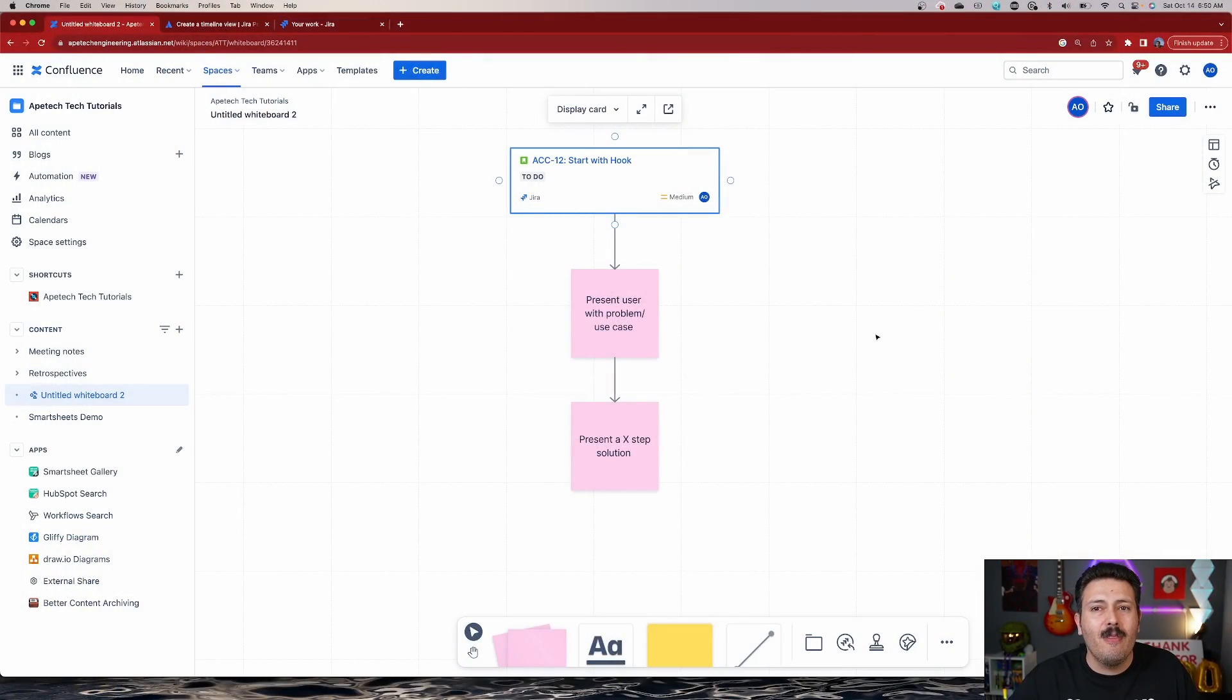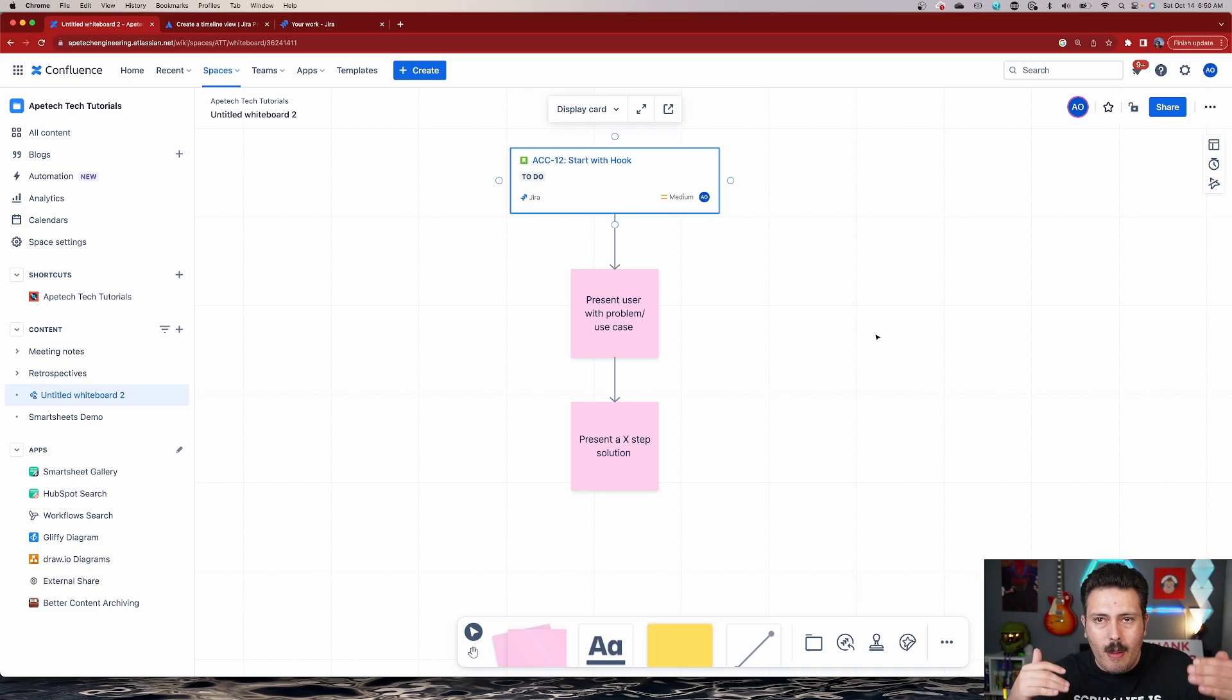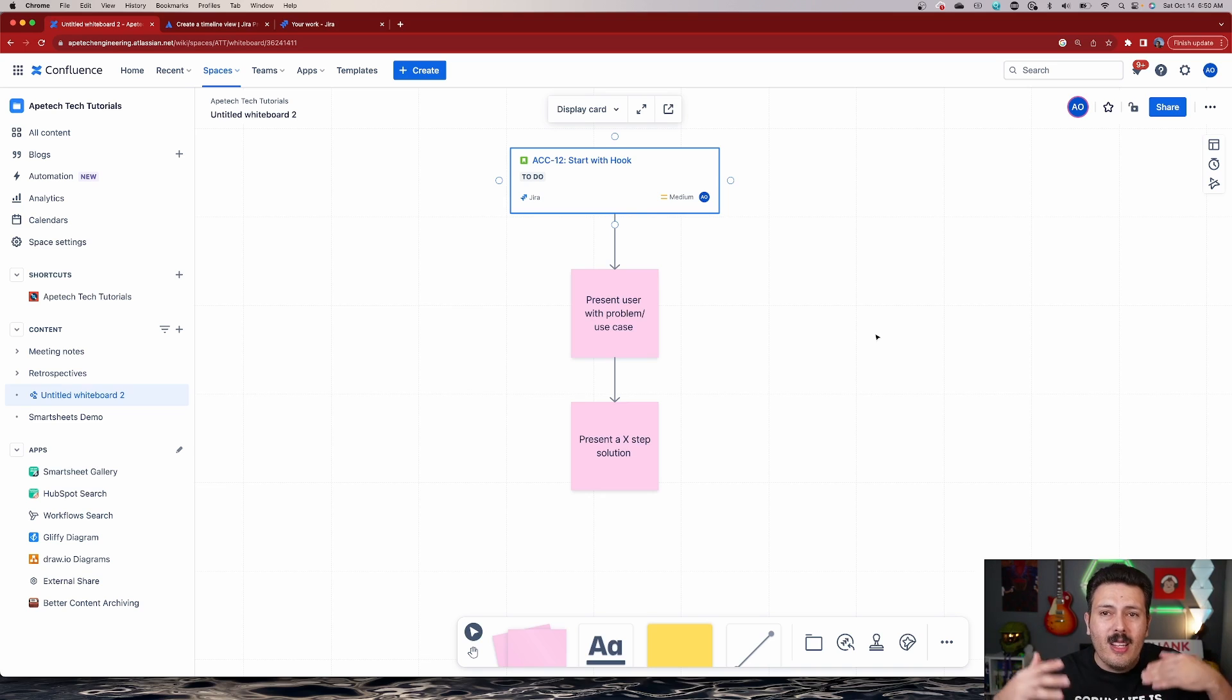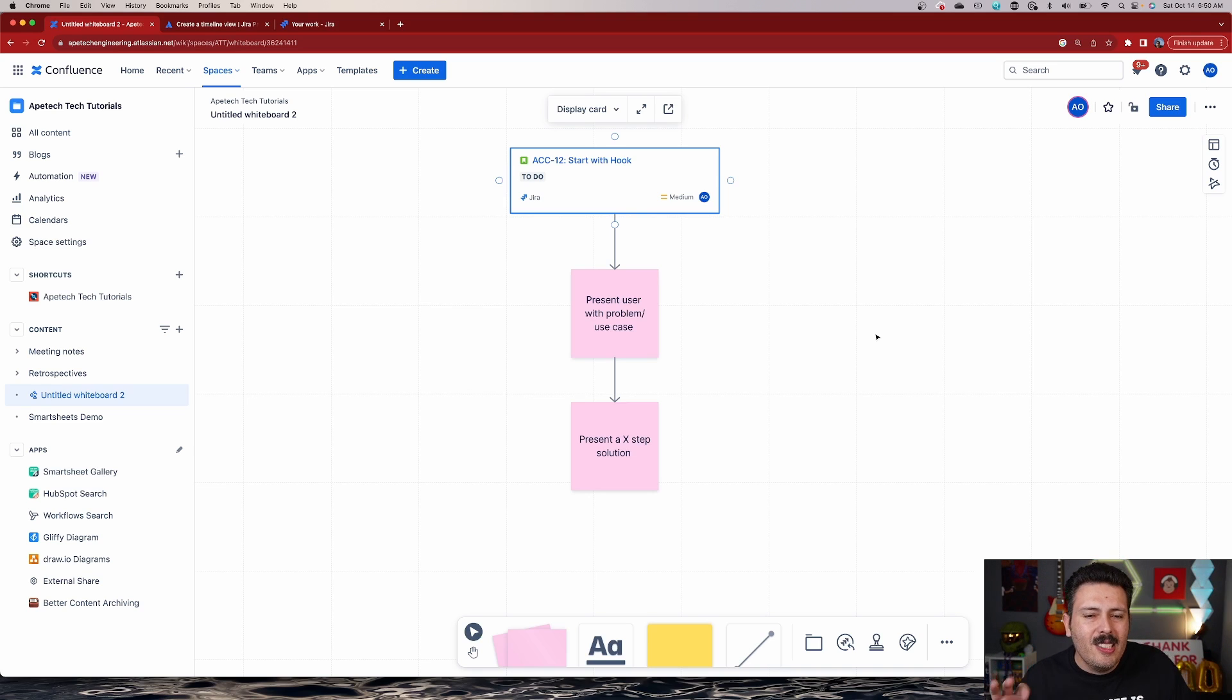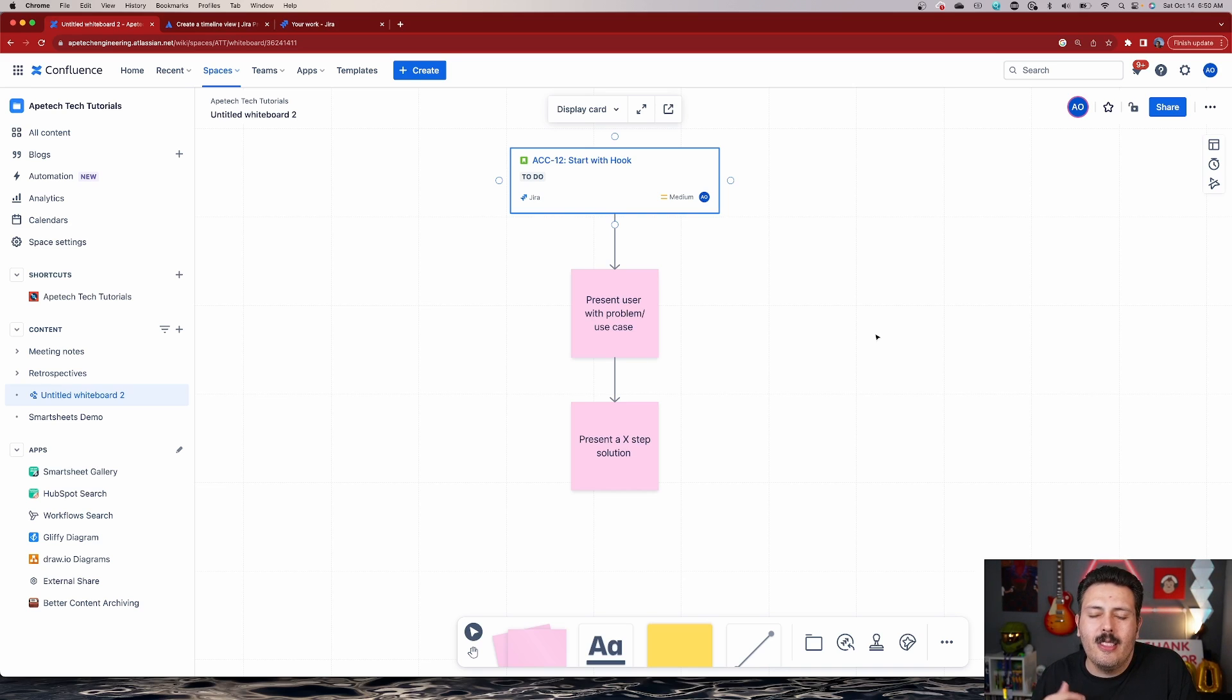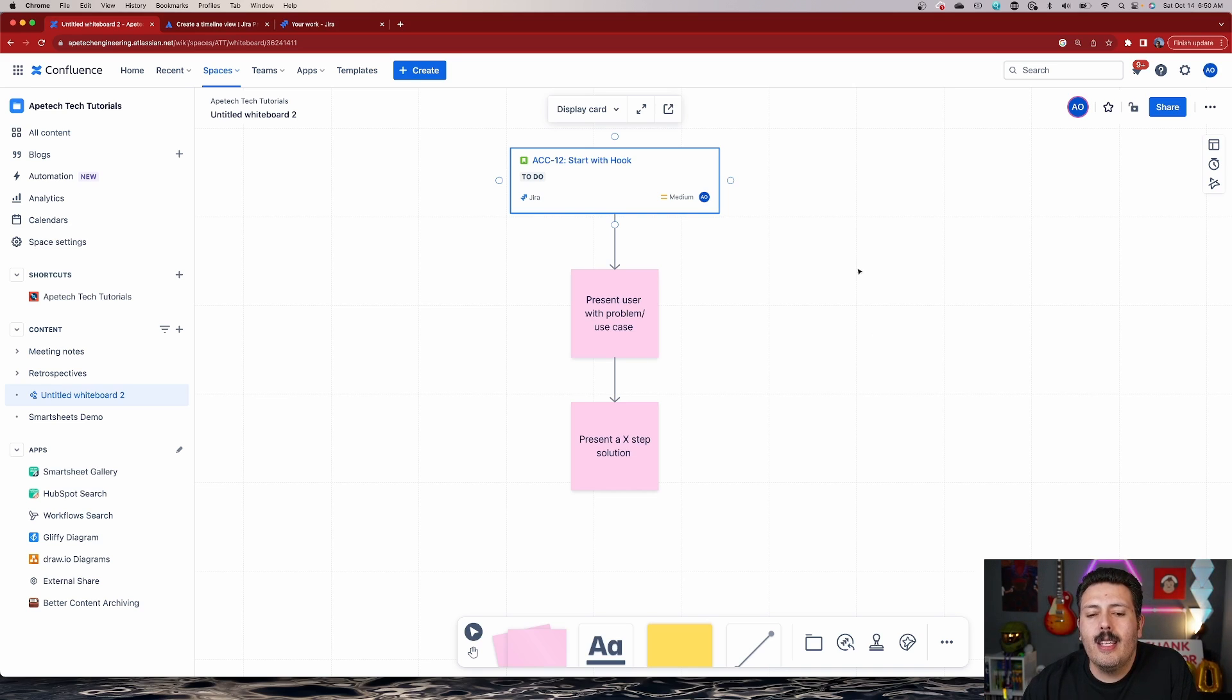And so this is really important because now we have something that is dynamically linked to Jira software as your developers are going to go into their backlog. Now it's automatically in their backlog so they can start planning this stuff out. And we also have a very visual way to look at dependencies. Because in Jira, looking at dependencies, looking at order of operations, trying to figure out which story should come before the other is not an easy thing to do. We could do ranking, but that ranking sometimes gets lost the moment you start to sprint. But here, you're not going to lose your ranking because you know that priority.